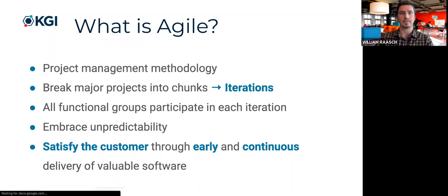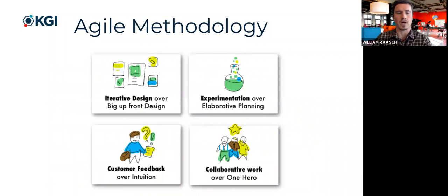Okay, so a couple graphics on this. This is really comparing Agile versus the older methods. One is iterative over big upfront. So rather than trying to do everything in one chunk, let's say you might have a project for your product 2.0. Rather than doing that all as one big development effort, you break it into, okay, why don't we make the patient-facing interface registration better?